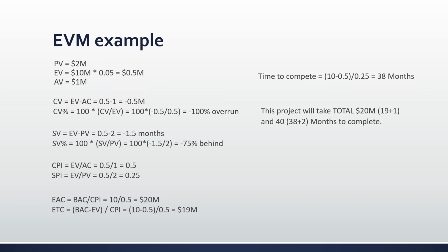It's really important for forecasting. And as you can see here, just going into this a little bit, we already know that this project is going to be over budget by twice the amount and way behind schedule by 4 times the amount. And so obviously some changes need to be made, and that should be something that the project manager brings to the stakeholders' attention so that before proceeding and being 4 times as late and twice over the budget, they can try to figure out something of how to make the changes.